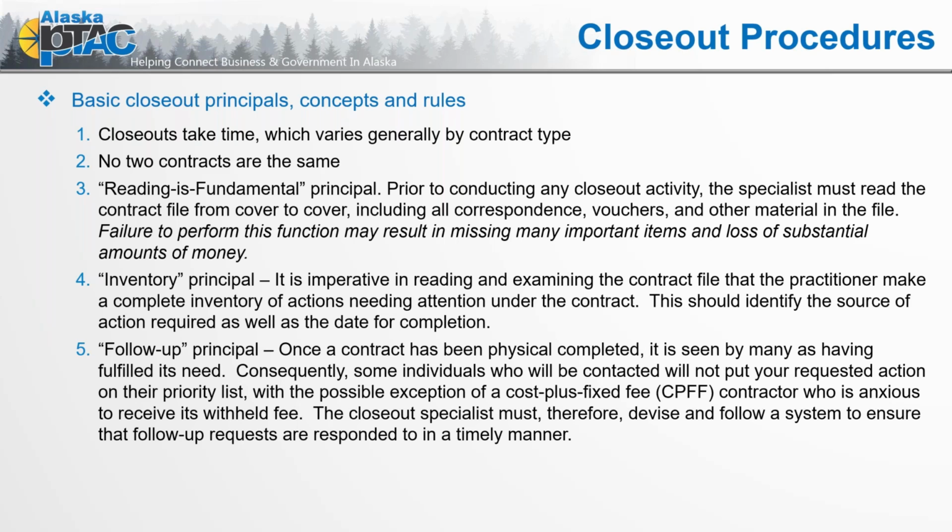Inventory principle. It is imperative in reading and examining the contract file that the practitioner make a complete inventory of actions needing attention under the contract. Should have identified the source of action required as well as the date for completion. Again, I think that's applicable whether it's agency or for business.